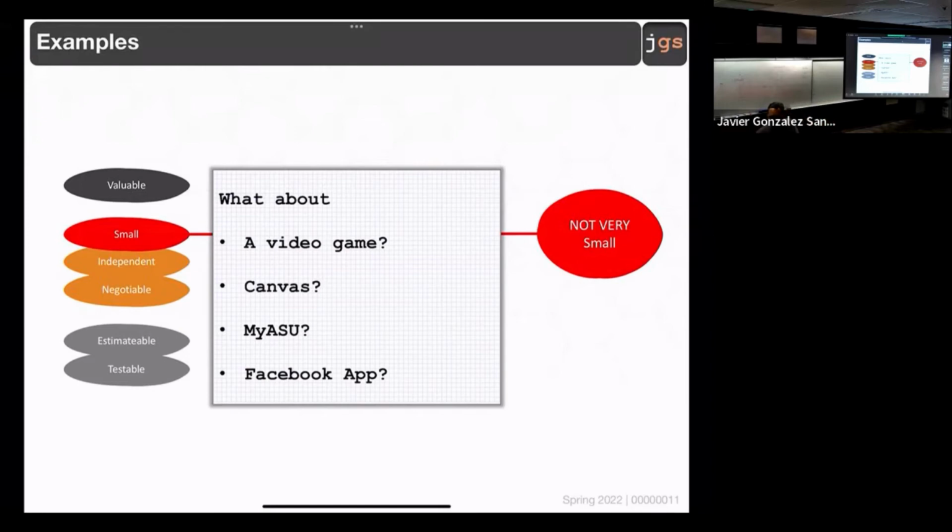Depending on the developer, small thing. Think about the average. Moving the Pac-Man, I am thinking about an average developer is something that is going to take days. Days, I am thinking about at least 8 hours, right? So the average developer moving the Pac-Man, I am thinking about the animation is going to be with threads. I am thinking about listeners. I am thinking about the graphic, the colors, some designer is going to be involved. Thinking about all these things around. And obviously you need to think about the testing part. Is not something for a couple of hours.